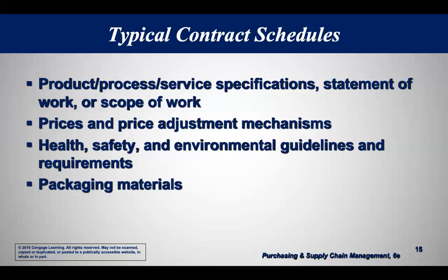That's something you really have to watch out for, like hyperlinks. We've all seen those. Well, you can have 2 or 3 hyperlinks there, and they can have all kinds of material in them. So if you're signing or being asked to approve an online contract or an electronic contract, make sure you check all the hyperlinks, because those will be attachments and Annex A and Annex B. And you have to make sure you know what's in them.